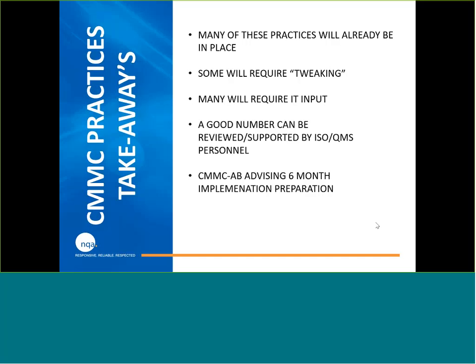Six months is not a bad rule of thumb, especially if you're thinking level 3 and, let's say, a low to moderate level of implementation. That's probably not a bad target. If you need to be level 1, 6 months might be a little bit generous. Certainly if you need to be above level 3, 6 months might not be enough. And I think, again, the key takeaway on this is your internal implementation preparation.